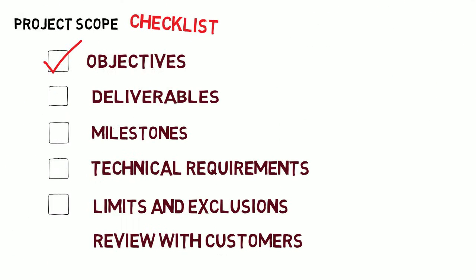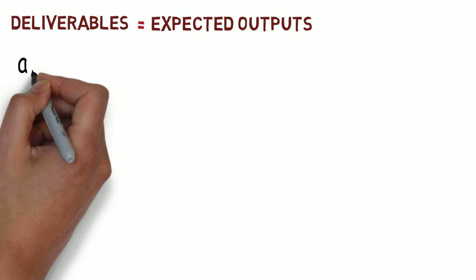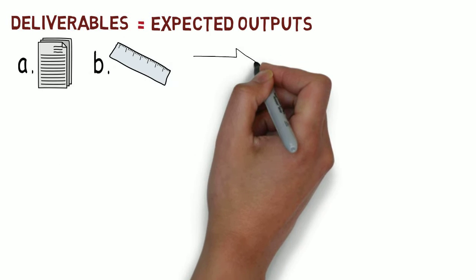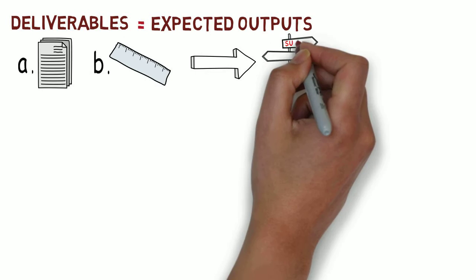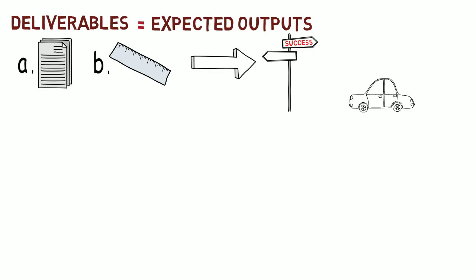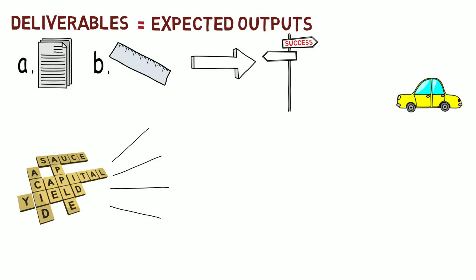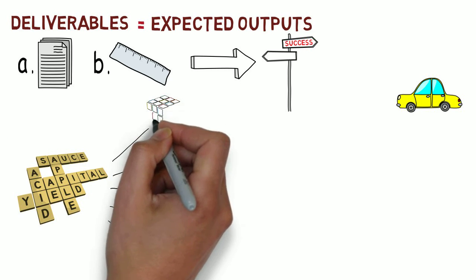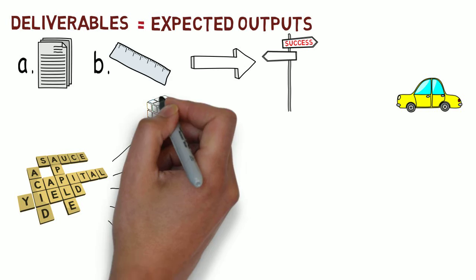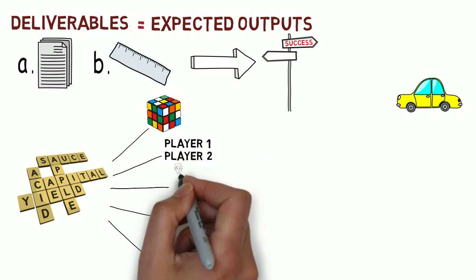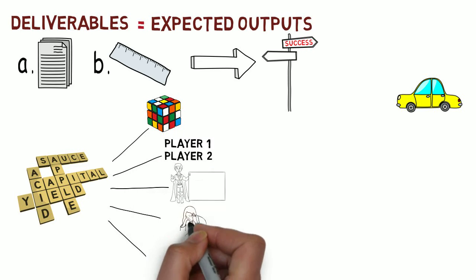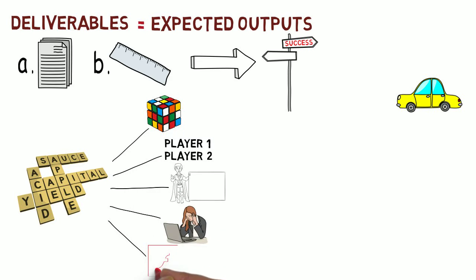Next step is to define the expected outputs for a project. These outputs should be concrete and measurable in order for us to follow a clear path without deviating from the project. So back to our example, to successfully develop the educational game, we need to have colourful and smooth graphic sprites appealing to kids, different game modes, prototype of the game, final tests, approved software.